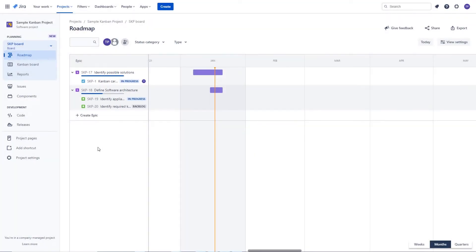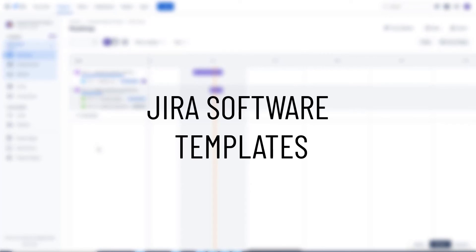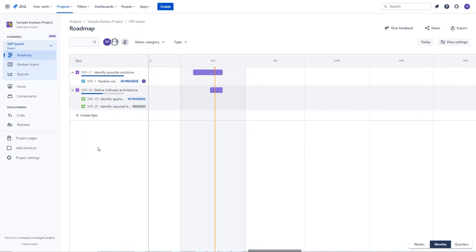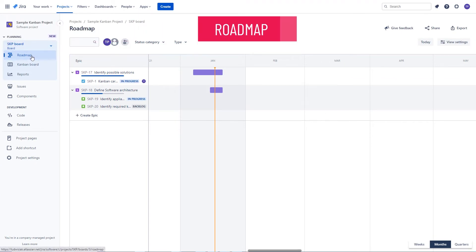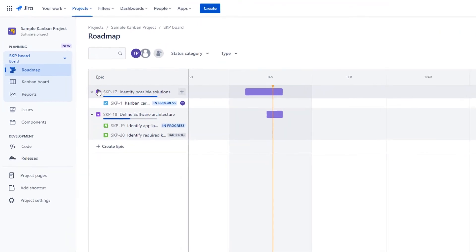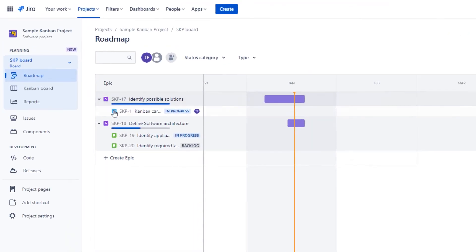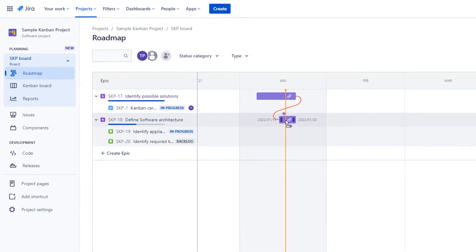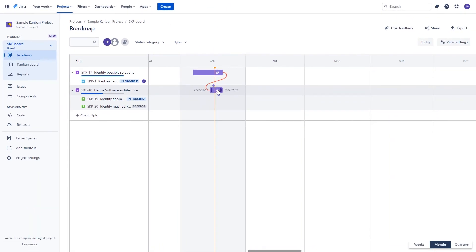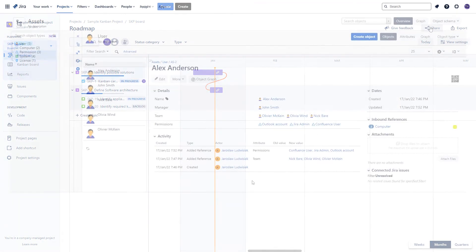Software development templates, coming of course from Jira software, will additionally allow you to work with the roadmap, which is similar to the timeline, but instead of showing the breakdown of tasks and subtasks, it focuses on epics and all the issues connected with those epics. Here, you will also be able to create dependencies or connections between the epics, change the timeframe that you're looking at and share or export the data.